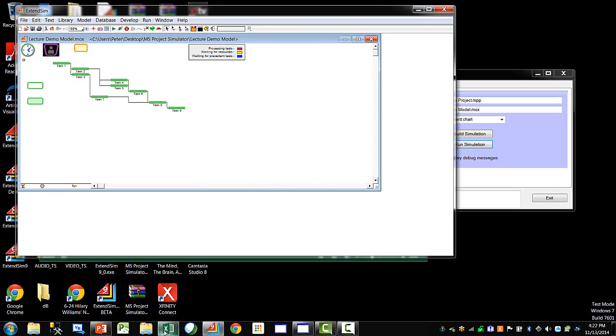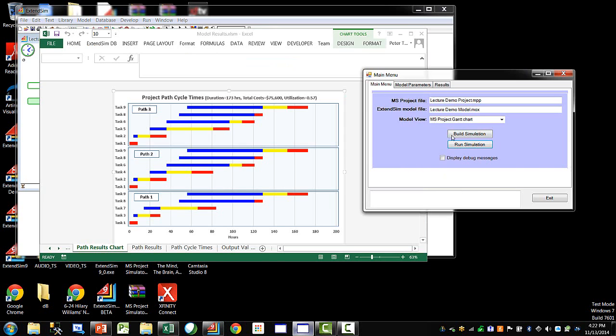Is that going to make any difference? Big difference. And you might have thought, maybe not completely expected, because we weren't on the critical path and we focused on task 7. The critical path was path 3. Well, guess who's the critical path now? We've now flipped again to now path 2 has become the critical path.